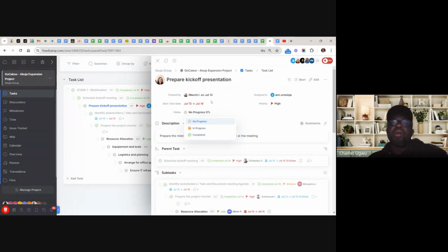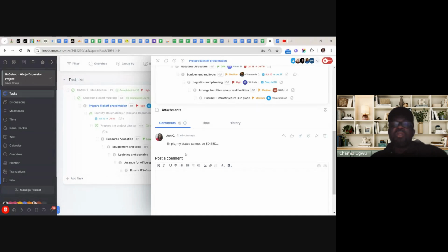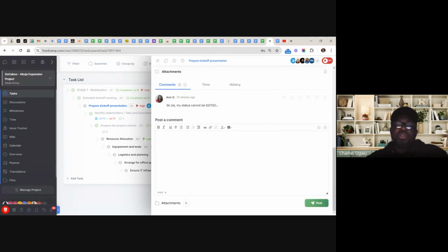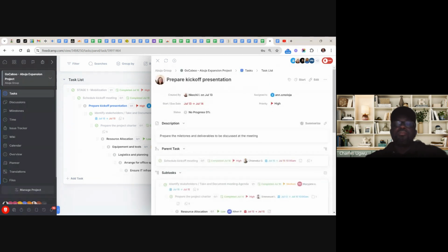But the point I'm trying to say is that it's not the person assigned that is supposed to update. You have to submit your report. When the person who assigned the work to you reviews your work, that person then has to update. It's not you that updates. All you need to do is come over here and submit your report. After reviewing your report from here, you can attach your report as an attachment, or you can write it down.